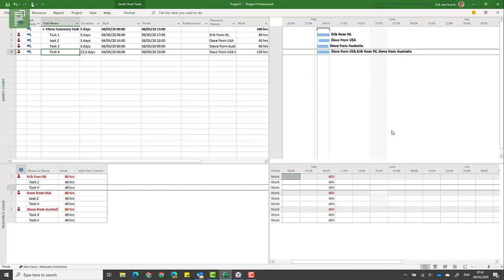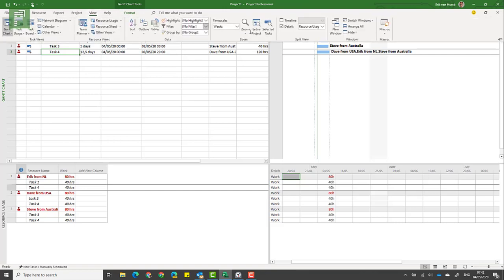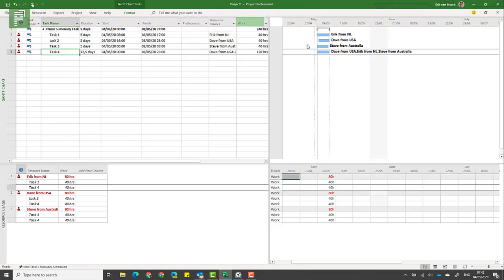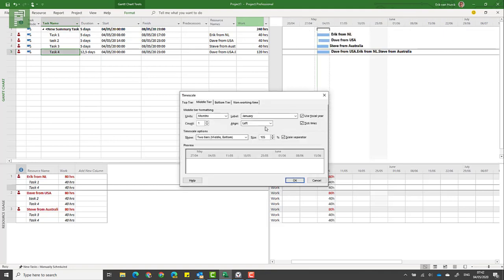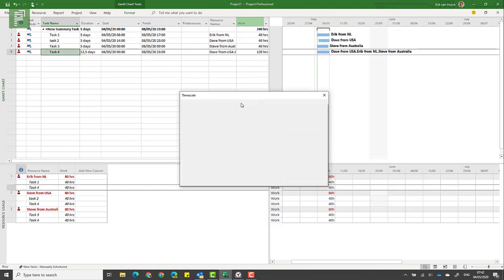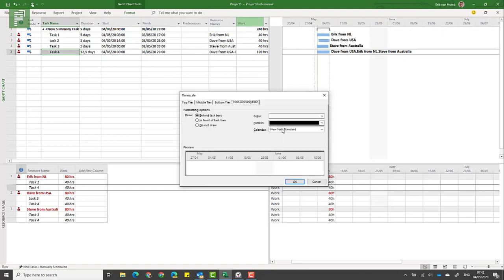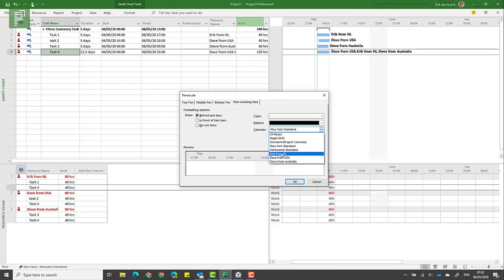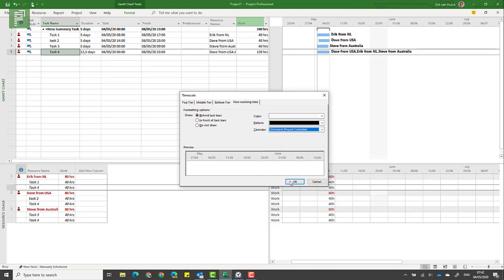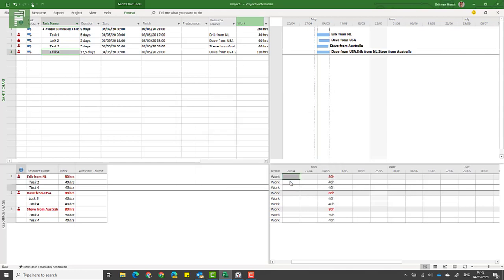But we already got everything completed before time, so we don't have Dave skipping a week in the example. But you might run into that in real life, so I just wanted to show you that as well. So again, that is clicking on Timescale and clicking on Non-Working Time and selecting the calendar that you want to visualize.